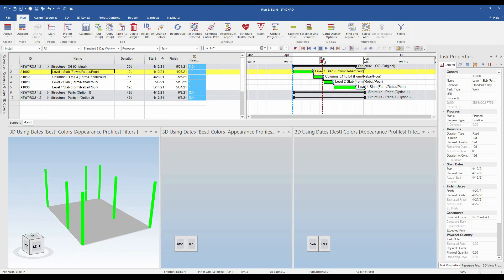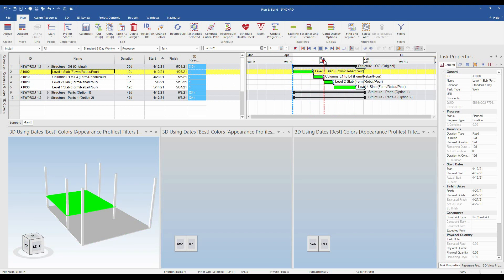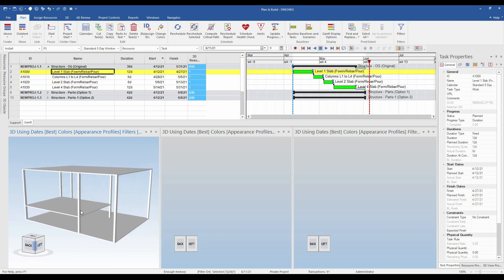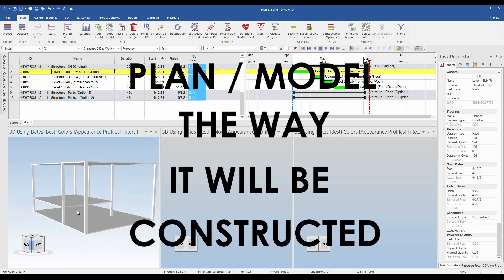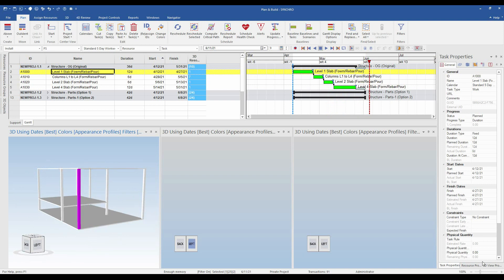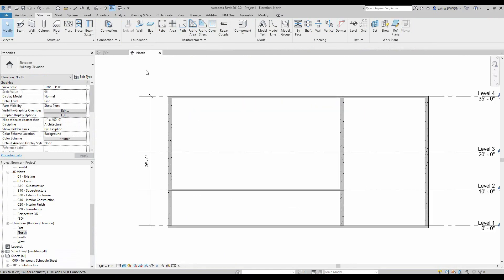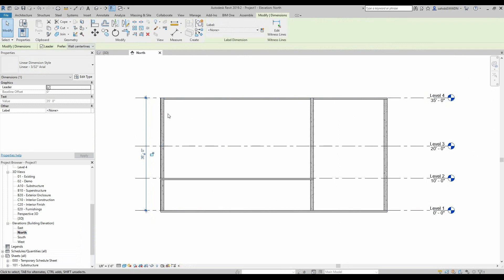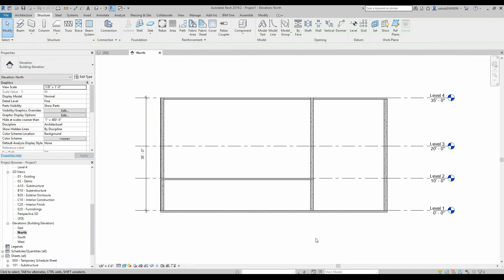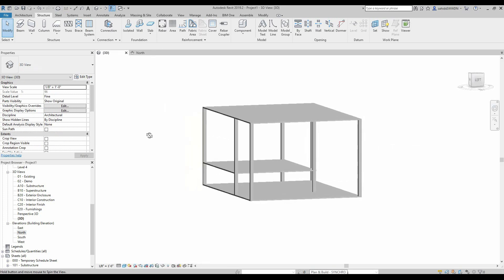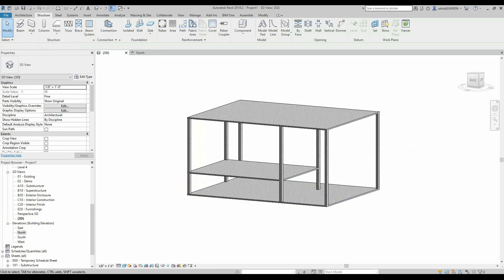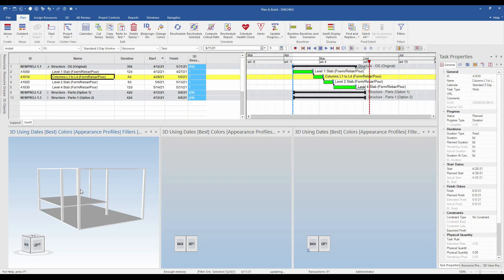But is it really this simple? Remember, we need to plan the way it will be constructed. These columns — if we come back to the Revit model — in the sectional view we can see they are around 35 feet, from level one to level four. But is this how a column will be cast? No. Anyone with an understanding of civil engineering would say that is not the way to cast a column. We cannot pour a column of 35 feet at one time, even with a 6-day duration — that is not how it will be constructed.